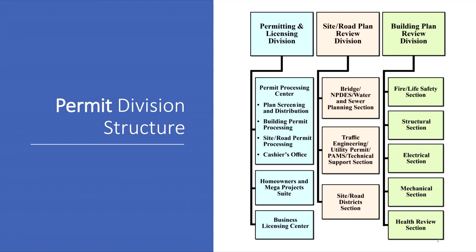Beginning January 2016, fire sprinkler systems, fire suppression systems, voice alarm systems, and fire alarm systems must go through the third-party review approval process. The Structural section provides structural plan review and accessibility ADA plan review. The section conducts structural plan review for all small and large commercial and residential projects.